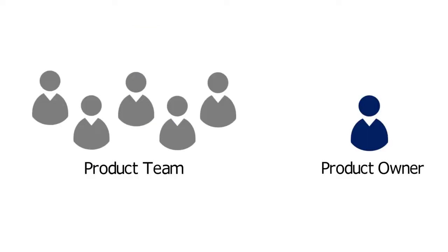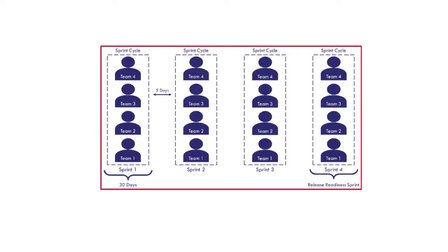Don't forget that at any point during the sprint, product owners and their designated product teams are responsible for monitoring and grooming the backlog with input from their IT counterparts. At the end of the sprint, any additional items in the product backlog are mutually agreed upon by the product owner and Scrum Master. These items are then reviewed by the HHSC Agile Governance team for final approval and reprioritization. It's important to remember a backlog item could be addressed in a subsequent sprint in the same cycle, or added to the next sprint cycle depending on the criticality and other prioritized items.